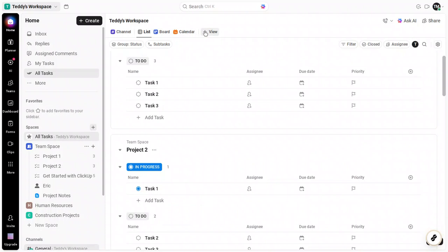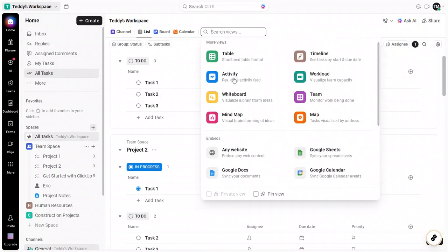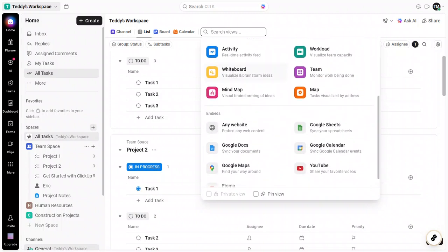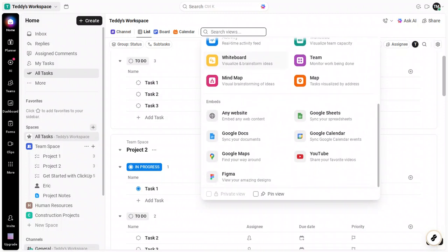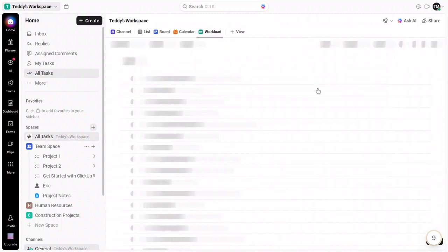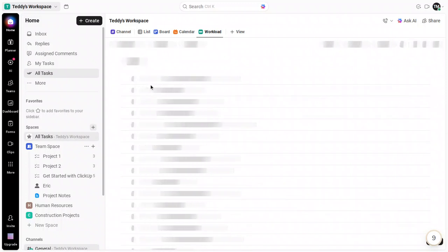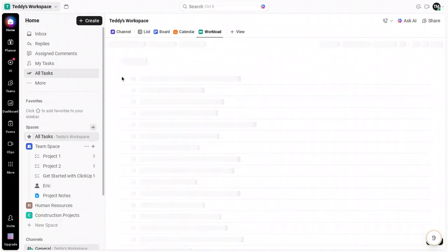Now apply those settings to real work. Open a list or folder with your tasks, click into a task, assign it to the right team member, and add a time estimate. Do this for each task you want included in capacity planning. Consistency matters here. Use the same units throughout, and be realistic about how long things actually take. You can always refine estimates later as you collect better data, but starting with thoughtful numbers will make your forecast far more reliable.